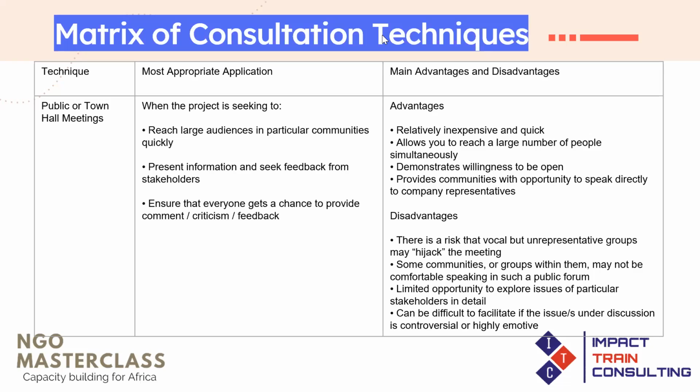Like we all know, we talked about in project management, when you're collecting data, do not rely on one method of data collection alone. Consultation, remember, is a two-way thing. So if you hold a public forum and you understand that the town hall hearing has been hijacked, and the information that you're trying to get, you're not really getting it, you need to think about what other method we can use to validate the information.